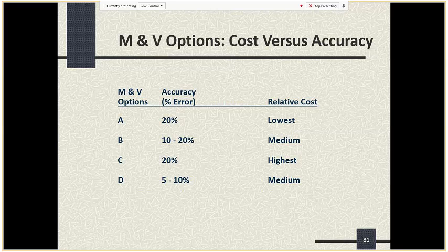I'll just give you an example. I did a project which was much smaller and less complicated than the one you're doing. And in 1 year, the owner of that project made almost 30 material changes that were not part of the project's original scope that had major impacts on ECMs. Well, when you realize the engineering time spent to track down the impacts of all those changes and all the data you had to collect and analyze and track, option C gets to be, or can be, a very expensive method. And that's why, I'm going to give you a little side note here.